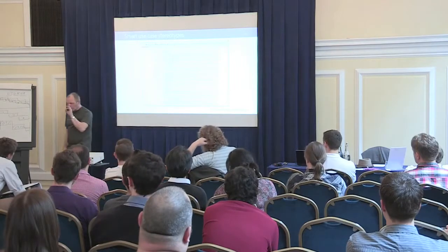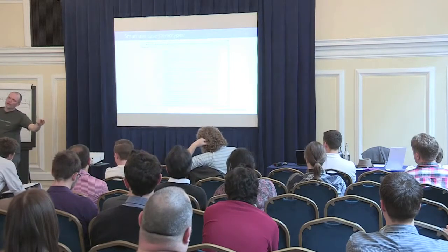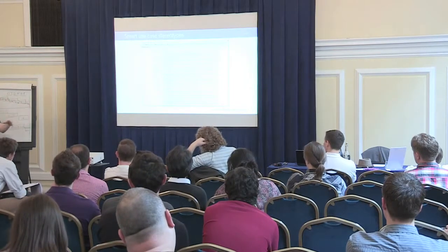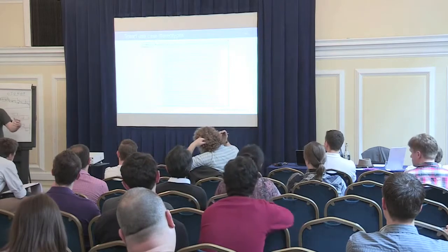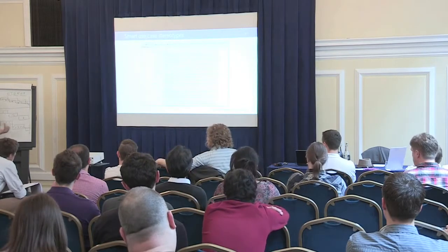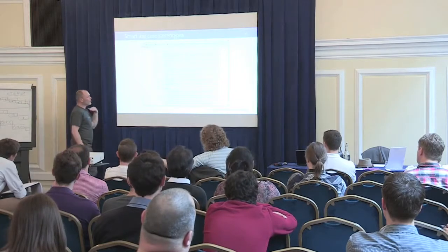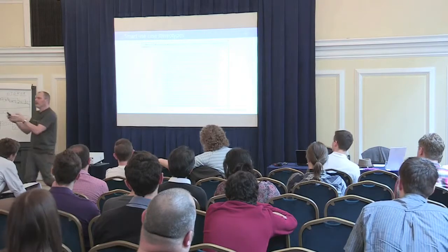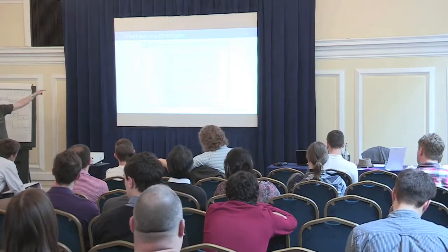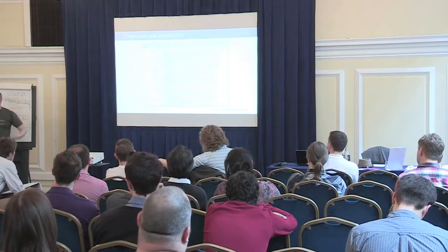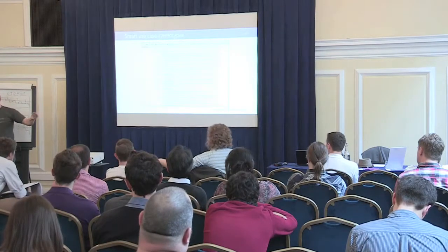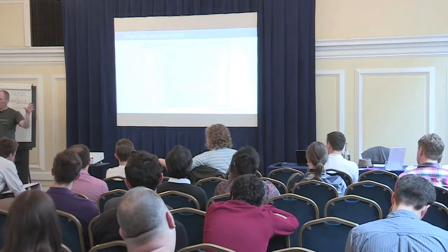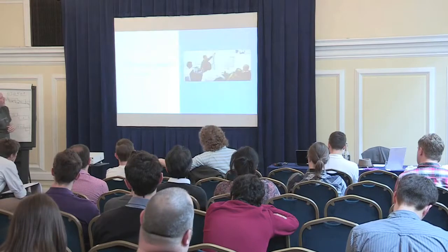Now, that allowed us to move a bit further down the road, because if we could identify standard types of use cases, that means a lot of things. That means we can test them more easily, because it's the same pattern, actually. Basically, they're patterns, right? Functional patterns. And also, we added an estimation scale to it that allowed us to estimate the use cases based on a point scale, based on these standard types. So now when we model stuff, we estimate on the fly. So as soon as we put out a little oval on the diagram, it's automatically estimated. Well, you do that with the team that you're modeling with anyway. So that's how we do it.